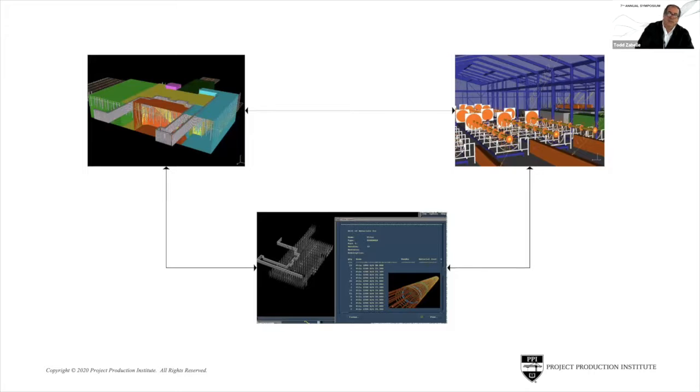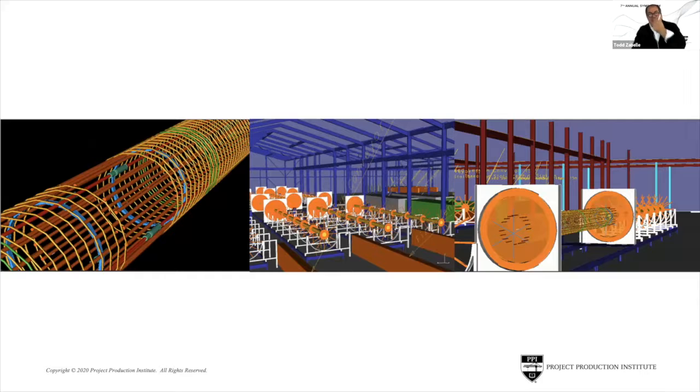And really quick here, finally, we also used what Mutu alluded to, this concurrent digital engineering, to design the foundation, the piles, and the factory that was going to produce the piles all simultaneously, and found that there were some issues with the machines and their ability to actually do the job, which was rectified in advance, well before anything was bought or purchased.